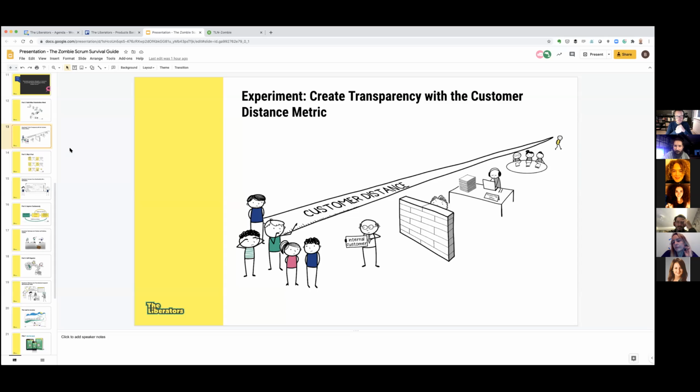Yeah. I think for me, the question would be: who's the real stakeholder? Because the Scrum Guide mentions the term stakeholder quite often, but who is the stakeholder? Who really has a stake in the product? And I think quite often people don't really have the right stakeholder. It could be someone that is interested in the progress of your project or someone that is interested in how your team is doing. That's not the same as being a stakeholder. A stakeholder for me is someone that gets direct value from the work that you are doing with your team.